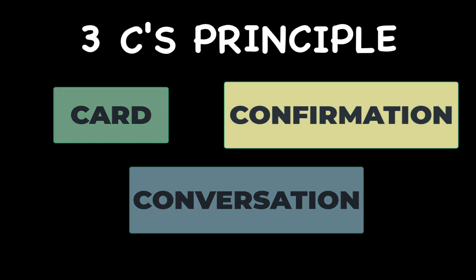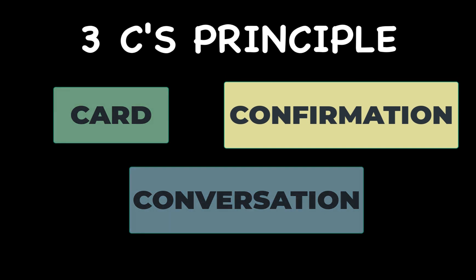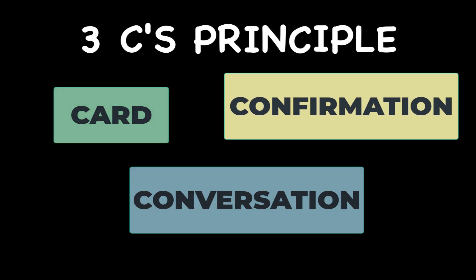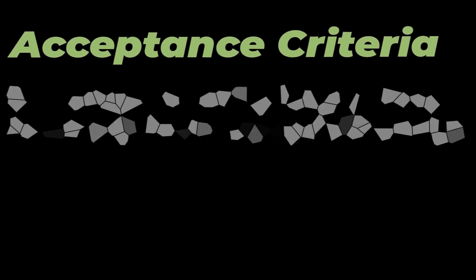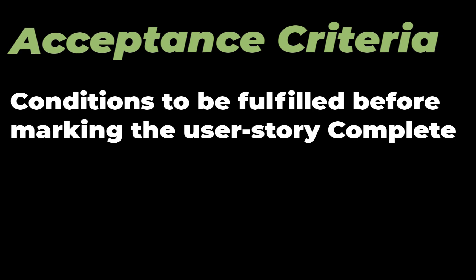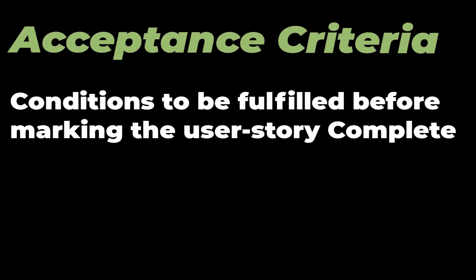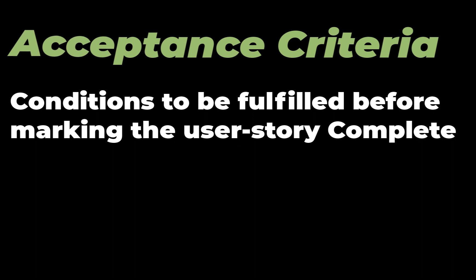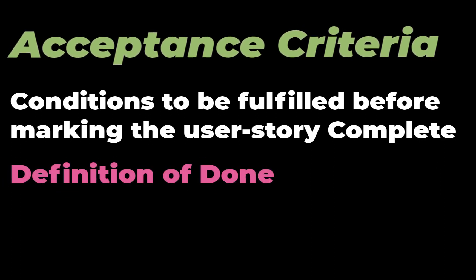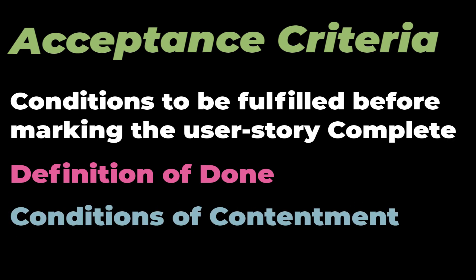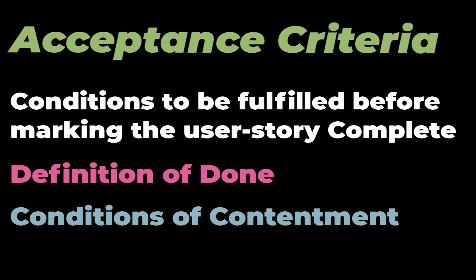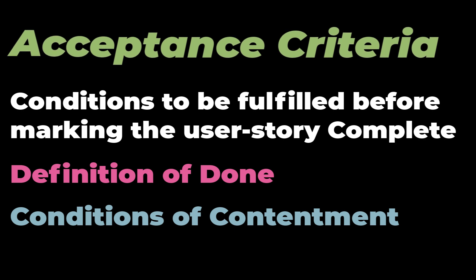Let's talk about the third C, that is confirmation. This C is to build user story acceptance criteria. Acceptance criteria of any user story are the conditions that should be fulfilled to satisfy the user or product owner that this story is completed. The teams have the acceptance criteria to be fulfilled as their definition of done. We can also say that these are the conditions of contentment on the user story card, and these conditions can be written on the back side of the card.